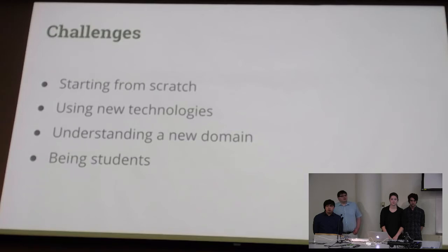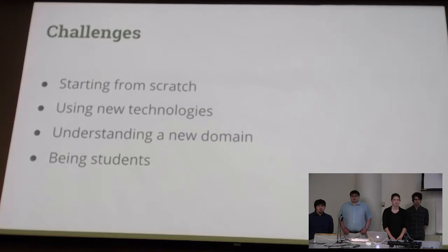We've also had to work with technologies we weren't all familiar with. Generally, at least one person in our team has been familiar with every technology that had been used to make up this project, but there was no technology that every person on the team was familiar with. This caused us to have to spend time teaching each other different aspects of each technology to make sure we're all proficient enough with them to build up the project in the way it needed to be built. This was a very good learning experience for us, but it definitely added to our development time.